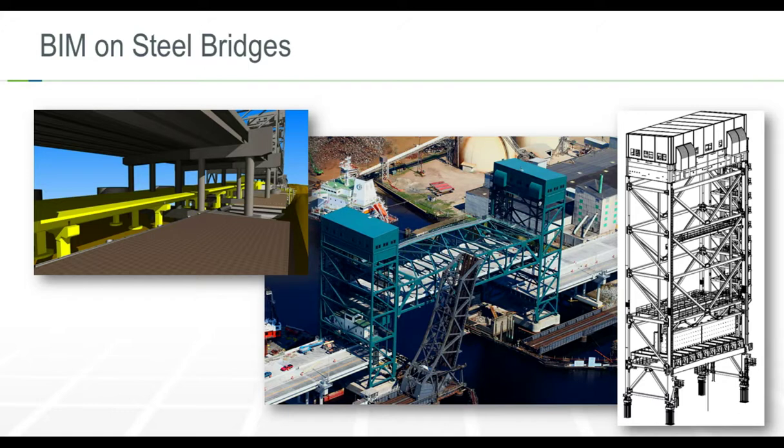This right here is actually a screenshot from the 4D model that we did on the job. We took the steel model, took models that we made of the existing bridge, a lot of the existing conditions as well, generated that all into one conglomerated model that we used for planning of the float-in of the lift span.